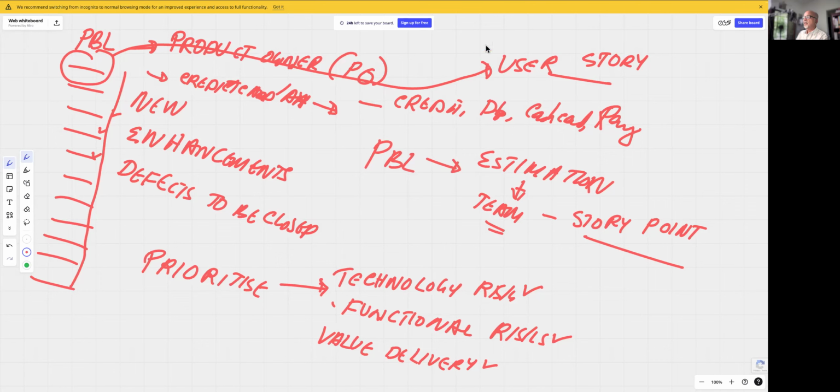And sometimes the product backlog may have very large features which cannot be estimated because they are too big. If somebody says the website should process payment, then n number of things need to be taken care of: credit card, cash card, PayPal, the rollback, etc. Or it may be like migrate this application from platform X to platform Y. That cannot be estimated because it must be detailed further.